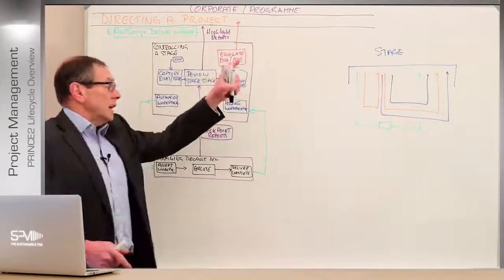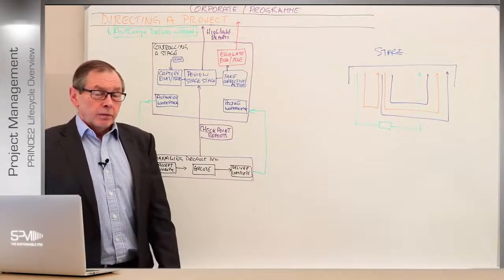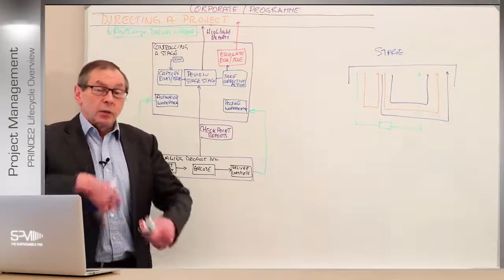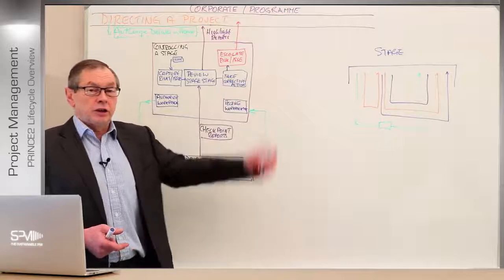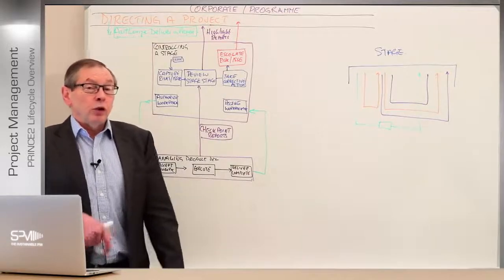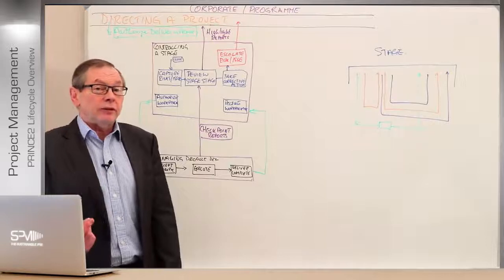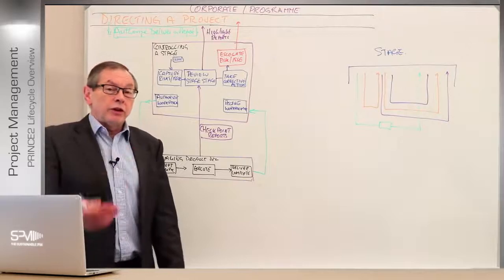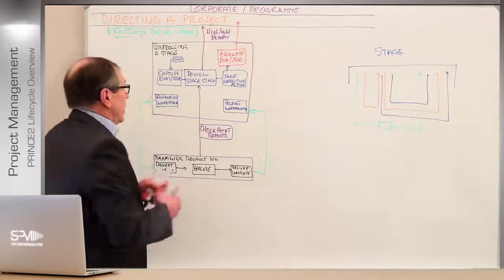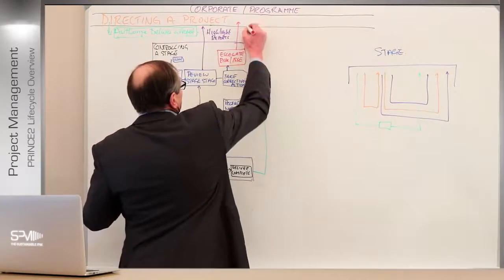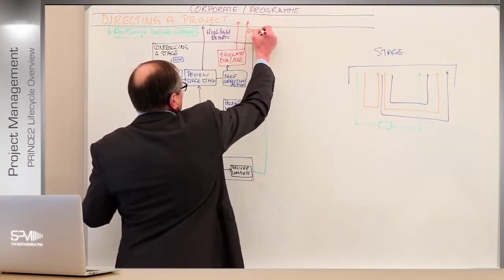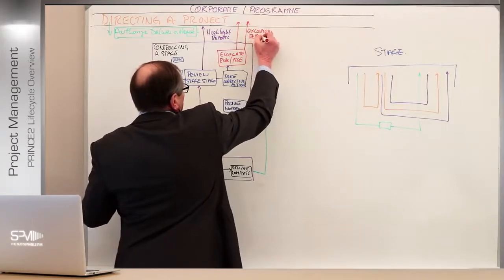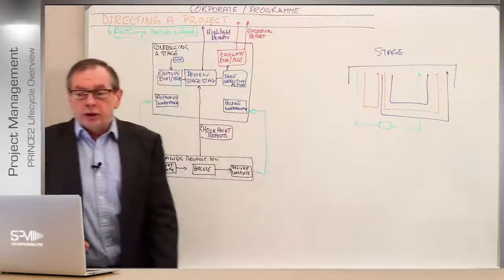The first thing is, can we fix it up within the bounds we've got already? If we can fix it up and don't go beyond the 6-week time frame, for instance, then we can carry on with the project and we can fix up the issue because we've now had a decision to do that. If it looks like we can't do that and we have to change the length of the stage, for example, or change the scope, then we're in exception. So then we have to raise an exception report, because now we're in exception of the stage, and that's when it starts to get important.